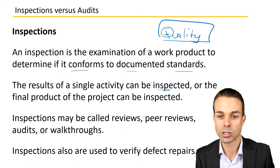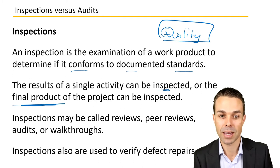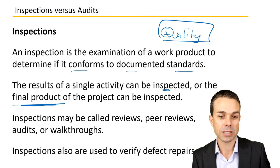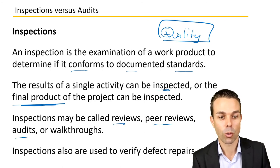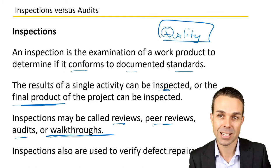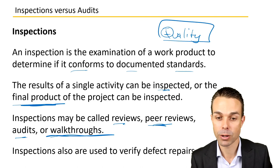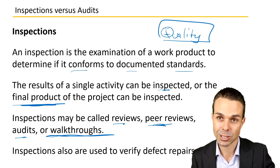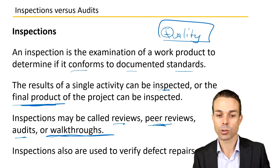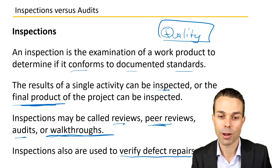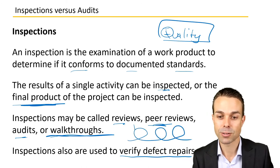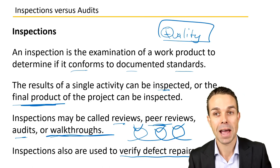The results of a single activity can be inspected, or the final overall product that we're delivering can be inspected. Now inspections might also be called reviews, peer reviews, audits, or walkthroughs. Especially in an agile sense you might have a walkthrough, a peer review, a demonstration, or a review to your product owner or to the customer. Inspections are also used to verify defect repairs — if we're fixing something, we will need to inspect it once fixed to make sure we're happy to proceed.